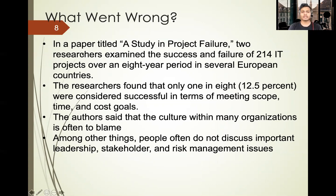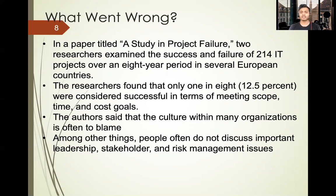There is another example. In a paper titled 'A Study in Project Failure,' two researchers examined the success and failure of 214 IT projects over an 8-year period in several European countries. The researchers found that only one in eight — that is, 12.5% — were considered successful in terms of meeting scope, time, and cost. The authors said that the culture within many organizations is often to be blamed. People often do not discuss important leadership, stakeholder, and risk management issues, and the major cause behind project failure is organizational culture.